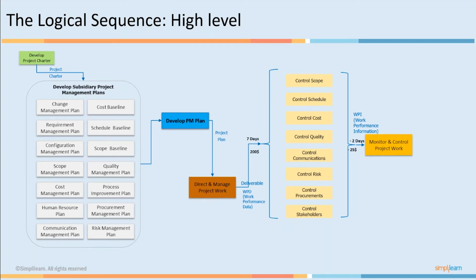When you look at the impact of this on the quality, that can be significant. When you look at the impact of this on the risk, that can be significant. There may be some risks associated with the schedule. Like if you miss your milestone by, let's say, 2 days, you may have to pay some penalty to your client organization. So in monitor and control project work, you will look at the impact of variance in one element on the other elements. And once you have done this variance analysis for the project, you are going to document the project progress update against your plan.